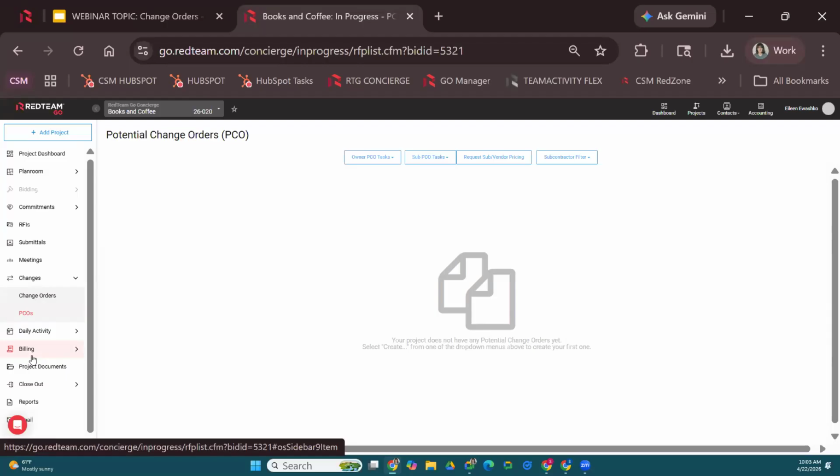I know how it goes on site. Owners very rarely approve their change orders in order. So I recommend to all of my clients, create a PCO. Another advantage of PCOs is you can stack multiple PCOs and combine them into one change order if you'd like.